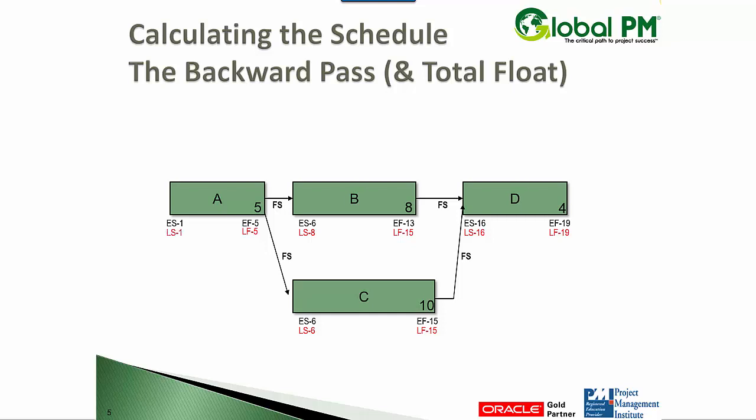So how do we calculate float? It's the difference between the late dates and the early dates. If I look at D, can I say late finish minus early finish or late start minus early start? Those would both yield zero. C would also yield zero. A would yield total float of zero. And B, as we see, has two days of float. In other words, the total float of activity B is two.